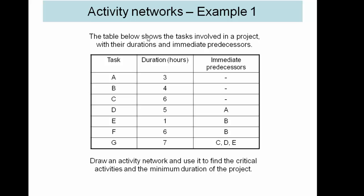Here we see a table showing tasks involved in a project and which tasks need to be finished before another task can start. So for example D can't start until A is finished, E can't start until B is finished, G requires C, D and E to be completed.